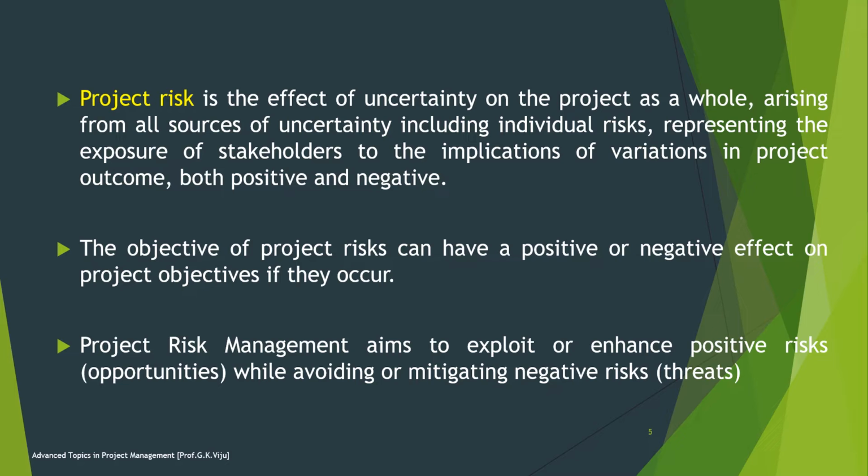both positive and negative. The risk management plan tells you how you are going to handle the risk in your project. It documents how you will assess the risk, who is responsible for doing it, and how often you will do risk planning. Some risks are technical, like a component that might turn out to be difficult to use. Some others are external, like changes in the market or even problems with the weather.